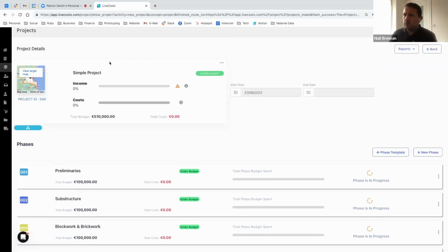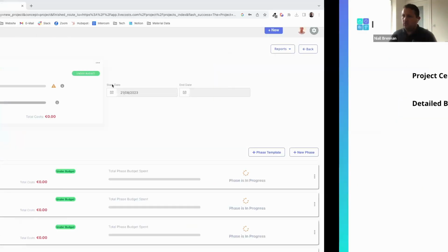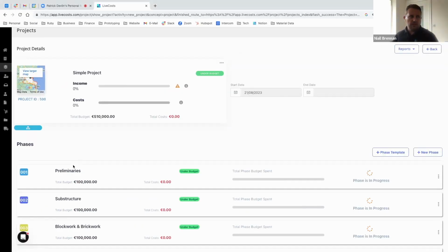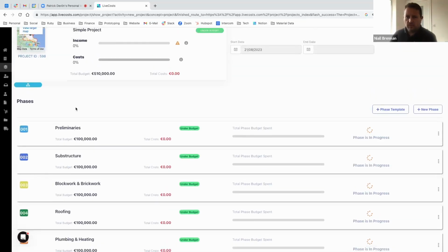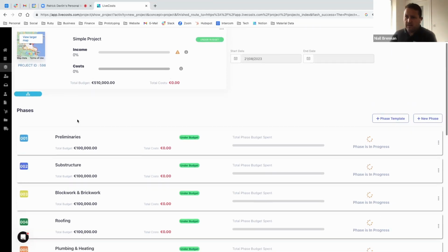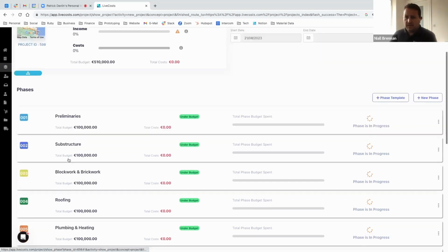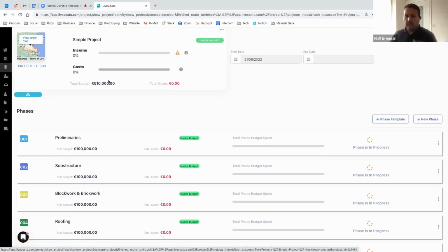Okay, so moving on to the next page, which is detailed budget analysis. So this is unique to each company. Again, we say we're going into builders, plumbers, electricians. This is unique to your company. This may come from a bill of quantities, it may come from how you structure your estimate, or it can be very, very simple insofar as it could just be breaking down into maybe labor, materials, plant and machinery, subcontract, and other. Even that alone, although it's simple to allocate to, is still breaking down that overall budget into something much smaller and just seeing how each element performs. So you're really just sanity checking your own estimates.